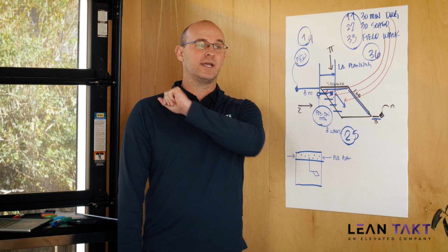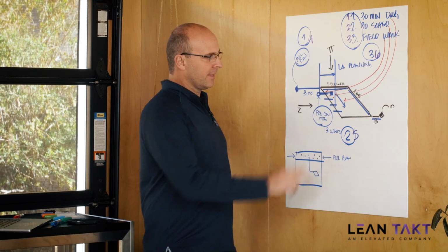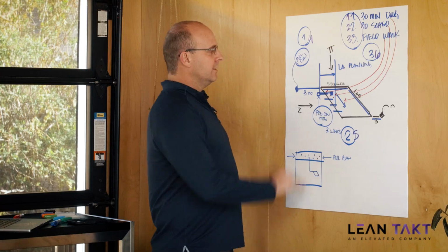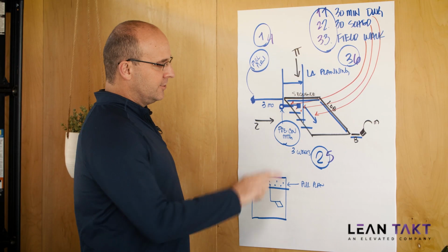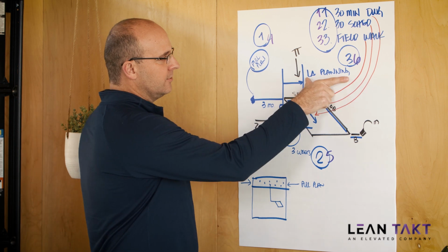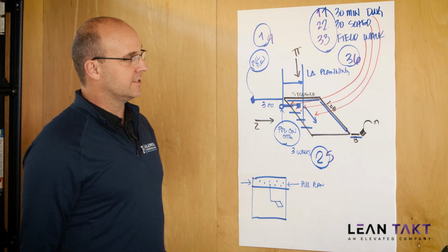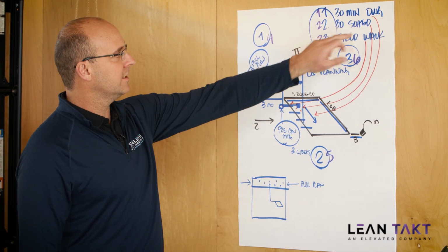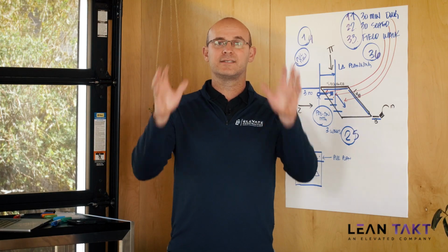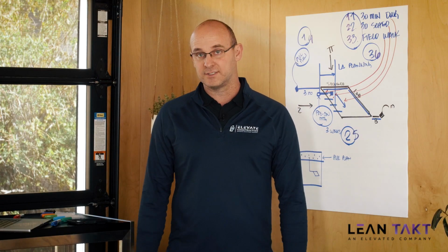So do not forget, for every phase that has a sequence, line of balance, buffer, and a milestone, do not forget to pull plan it 3 months ahead, to do pre-con meetings for every critical wagon 3 weeks ahead, and to do look-ahead planning out every 6 weeks. If you pair that with studying the drawings, being in the schedule, and doing a field walk every day, you will be a builder with consistency, stability, and respect on your project site.